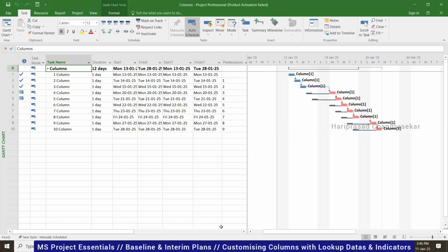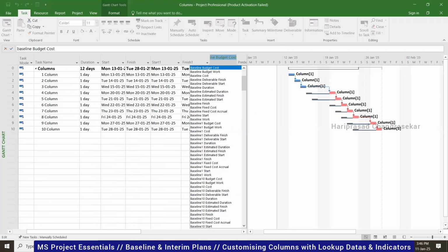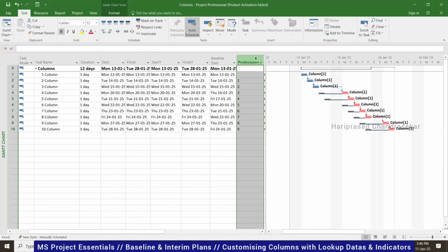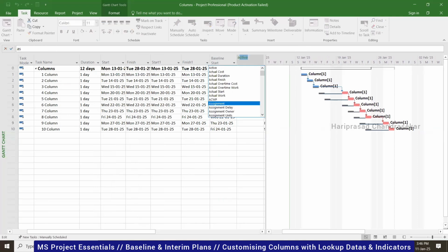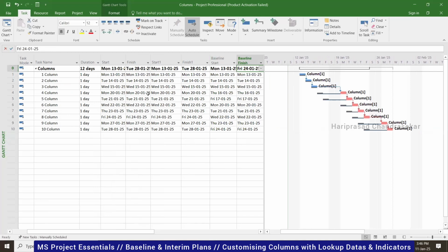What is the difference between baseline one and start one? Both are the same, right? No, see, now the baseline dates were different. Here I am able to insert baseline start and baseline finish. That is a fixed one, after we did something. Now, if you want, you can copy, otherwise it is not needed. You can see here it was 20. The 20 we copied to start one also, but actually the baseline has 16.